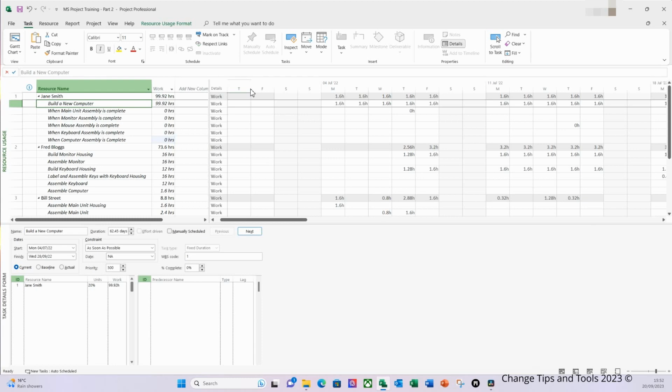Again, there are opinions. Please look at your organisation's planning standards. I personally believe it is good practice to assign somebody to the milestone, typically the person who is accountable, not necessarily the person who is the doer, but the person who is accountable for the delivery of that milestone. So it could be a sponsor, for example, also. But for the purposes of this exercise, we've assigned our project manager.